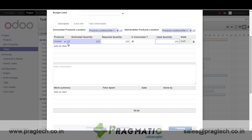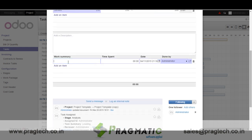Having tracked actual consumption, we also have the option of capturing QA on each task, with a report generated. Only once the QA is passed is the task considered complete. This takes care of QA certification for all interim payments — if you are a contractor, you can provide these QA reports to the client, and in the case of a builder, to the end users to get payments processed.